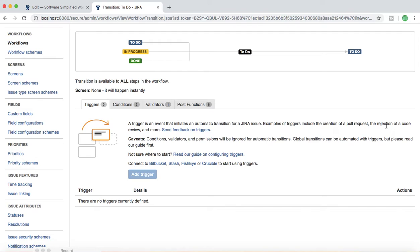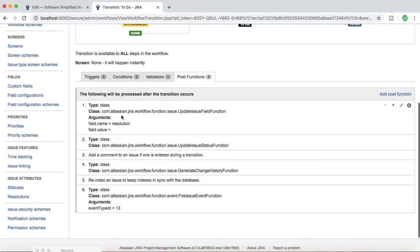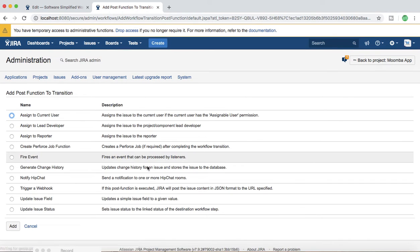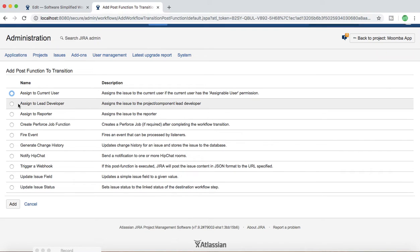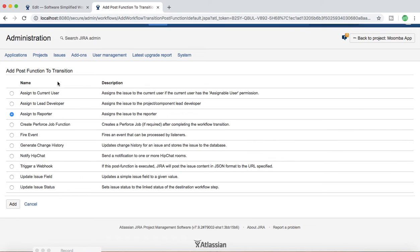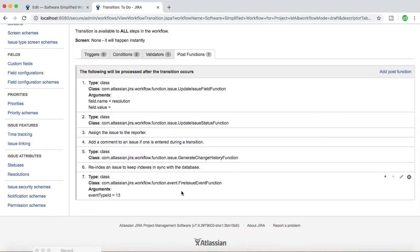The next important thing is post functions, which are automatic actions that occur after a transition. In the Post Functions tab, you can see the post functions available. If you click Add Post Function, options include Assign to Current User, Assign to Lead Developer, or Assign to Reporter. You can choose any post function and add it. As soon as an issue is moved — transitioning from one state to another — depending on the post function chosen for that transition, those details will be automatically populated in the issue.